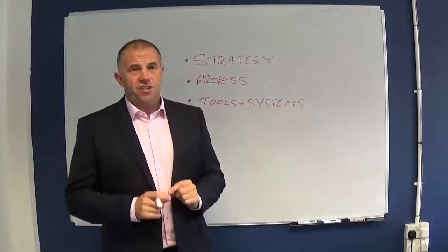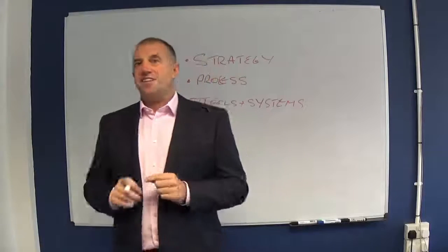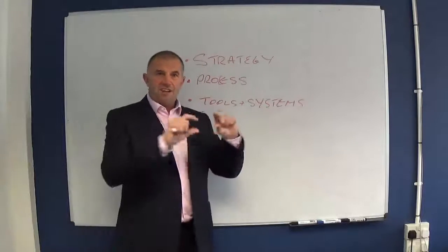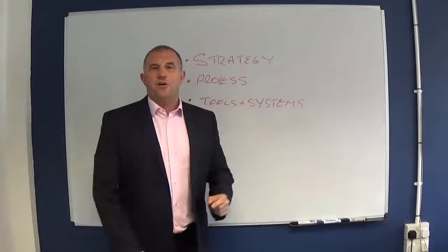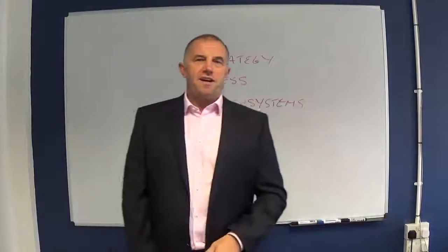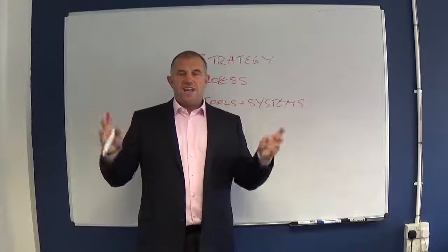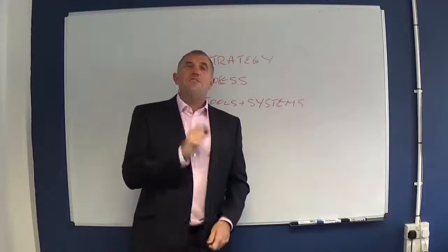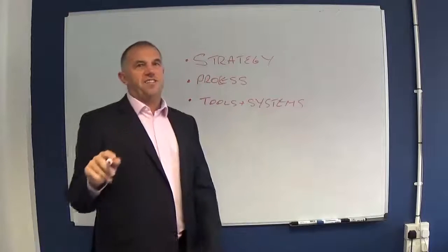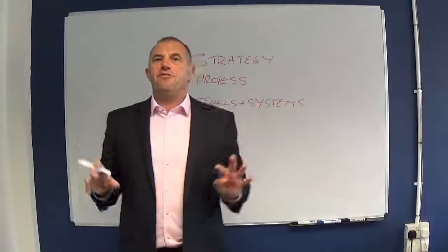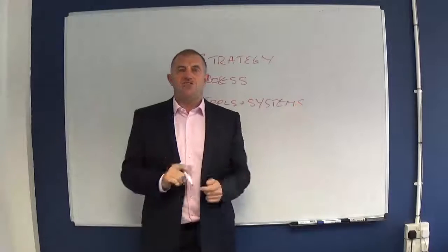Well, what they don't do is explain how risks interact with each other. They're a linear process and a list of things that might go wrong, and you'll kind of feel better because you fed it in. Actually, what you need to be able to do is see how the risks interrelate. So the most important thing you can have is a risk map, or at least have your risks mapped out on some sort of matrix.